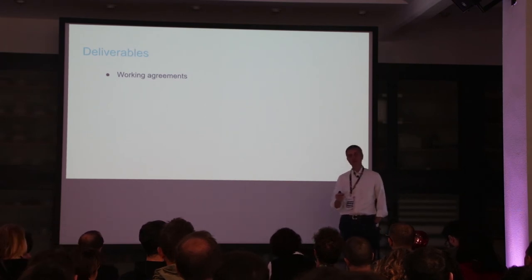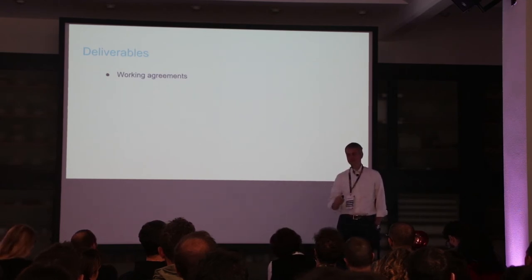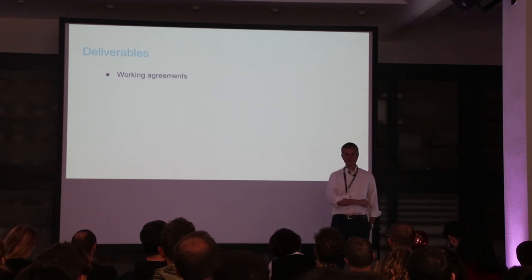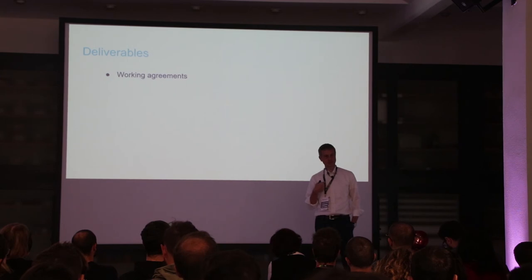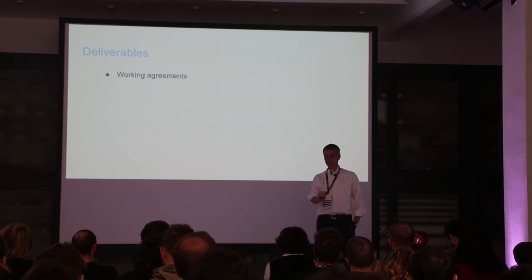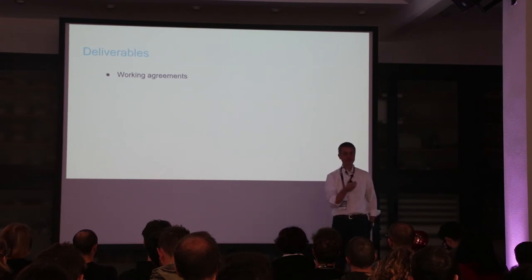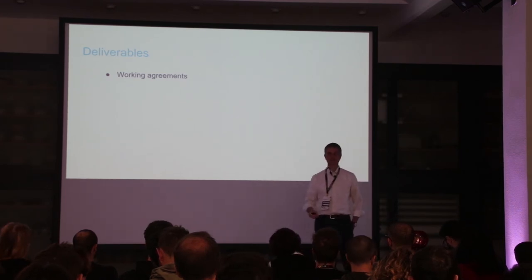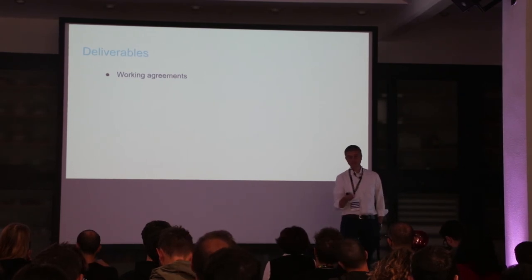Working agreements are a sheet of paper where the team defines their rules. That is why setting rules is the foundation of a community. It's the foundation of a change in the way you consider your responsibility. For example, we gather every morning at 9. We do this, we talk one person at a time. We decide all together which deliverable we want to do for any screen. I cannot say what the perfect working agreement sheet of paper is, because any team can change the working agreement if they think that they should.